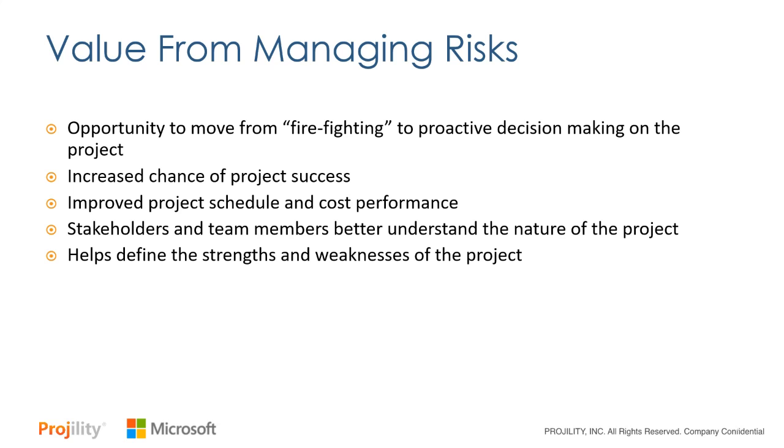It can also help you define right up front the strengths and the weaknesses you have with the project. If you identify a very large list of risks in the beginning, and a lot of those are maybe high cost or high impact that can't be mitigated, there are some weaknesses in this project right from the beginning. You're spending X amount of the company or the agency's time and money. Is it really worth it? And are you going to get the kind of return you're looking for given these potential risks or potential problems coming up?